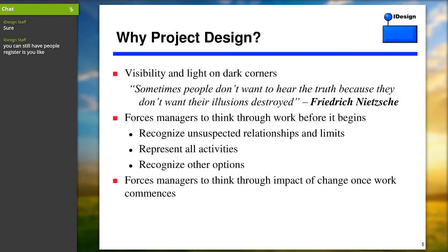As the work starts, there's a mini project design cycle. Things change and things are being dumped or changed. You have to do a mini project design cycle. And that actually forces managers, again, to think through the impact of change once the work commences. Just as important to stay on track all the time.